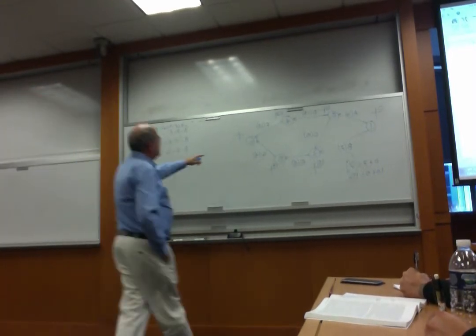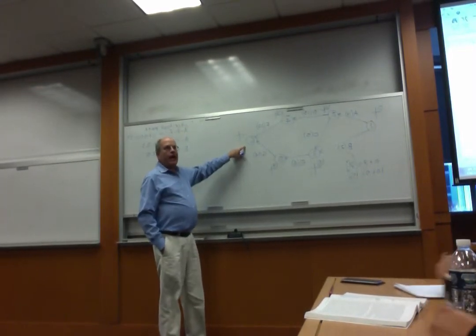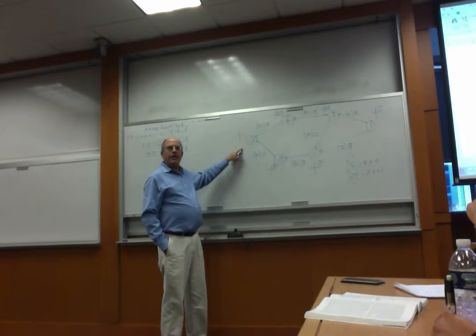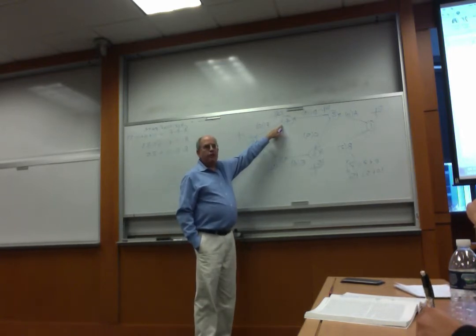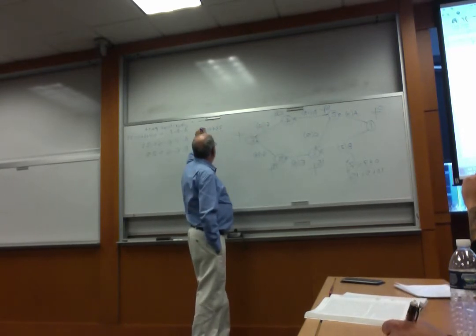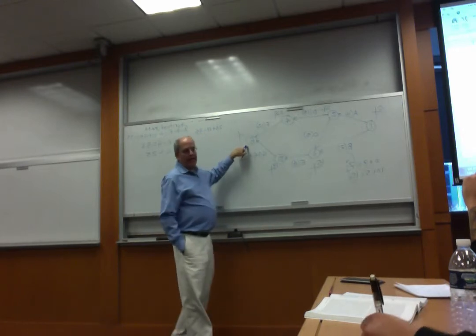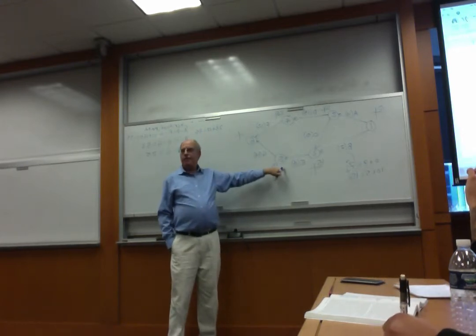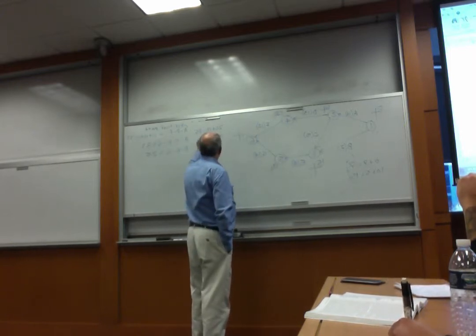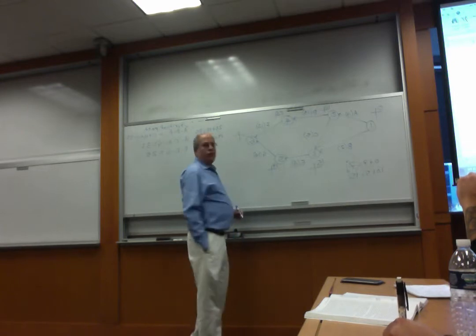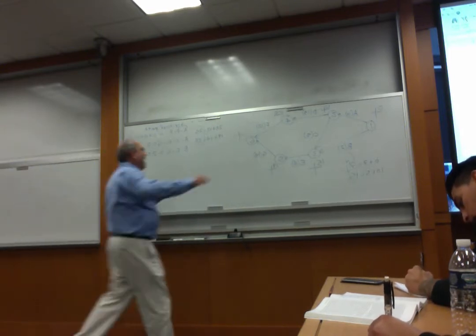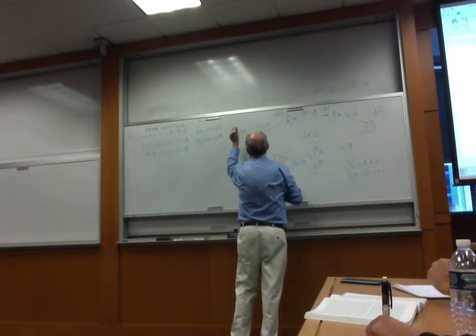The same issue we have now at 6. How can we get into 6 when we go forward? There are 2 ways to get to 6 going forward. One way is to get there from 4. The value will be 23. Let me write both. 23 plus 12, it's 35. But there is another way to get to 6 going forward, from 5. If we choose the value from 5, it will be 19 plus 14, 33. Okay, whenever we have a choice, what do I say? The longest. So we're going to choose 35.